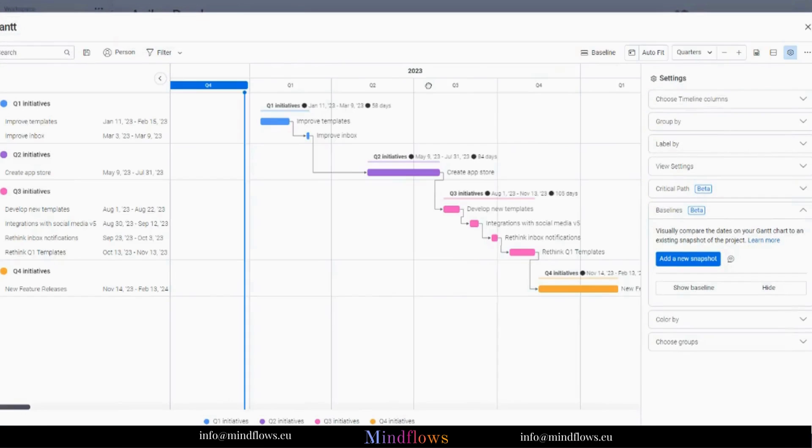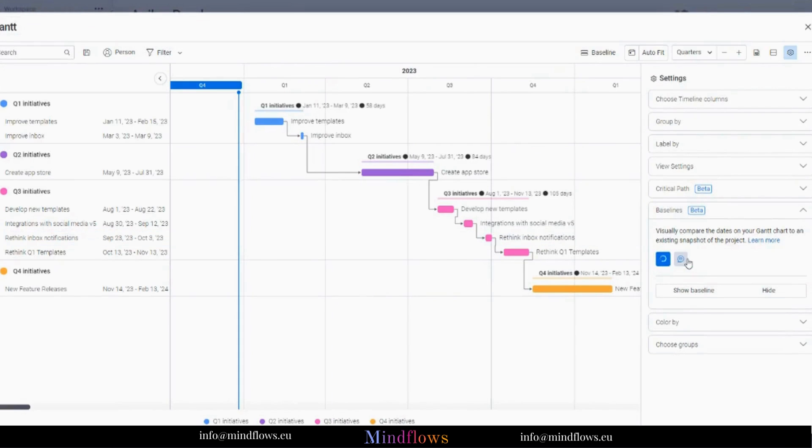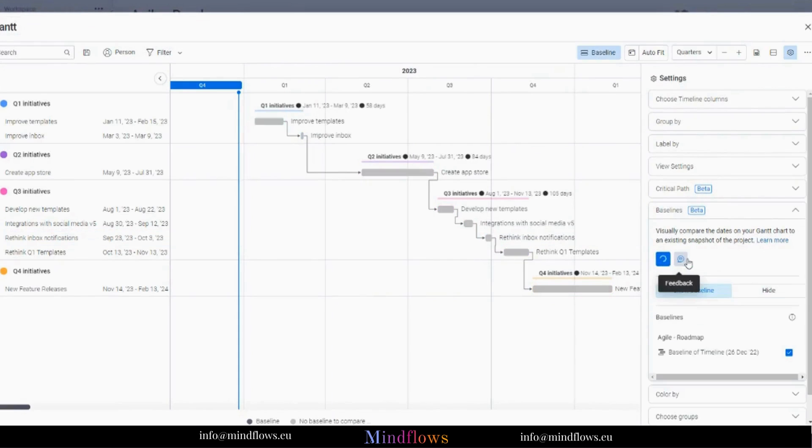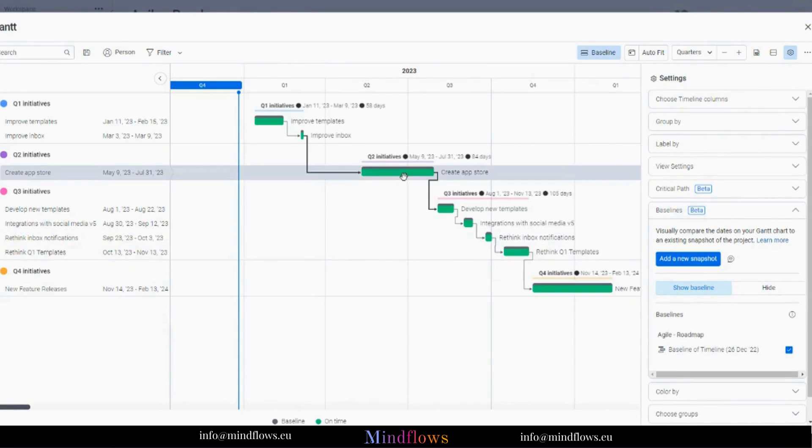By clicking Add a New Snapshot in the Baseline section in Settings, items are changed into a gray snapshot. No matter what happens to the item's timeline later, it stays fixed in place.